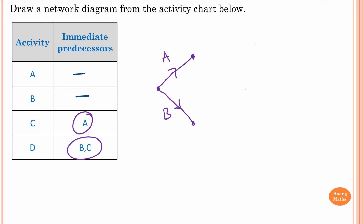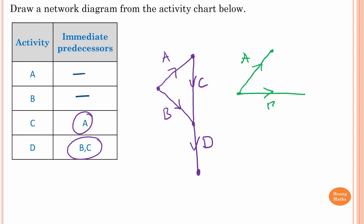Activity C is connected with activity B. For activity D, B and C are immediate predecessors, so I can draw it like this. You can also redraw the diagram — this is A, this is B, this is activity C, and this is D.